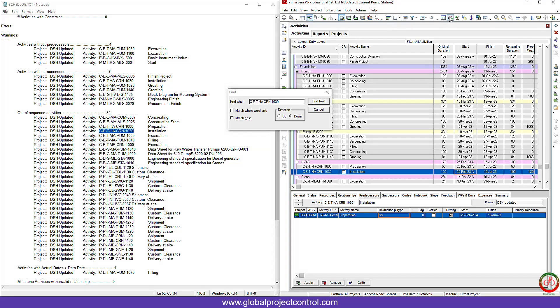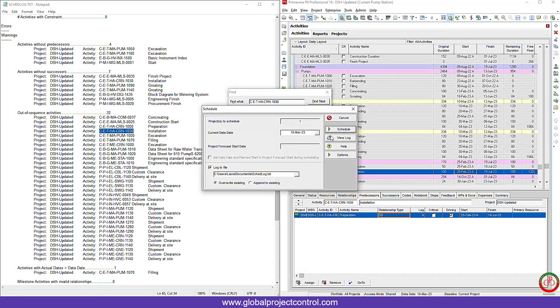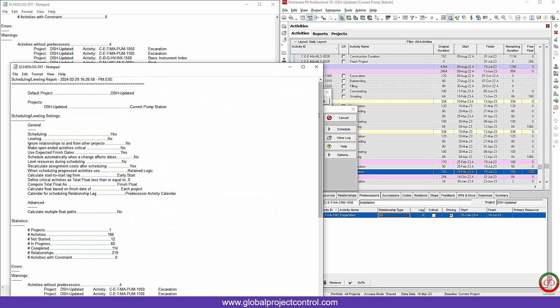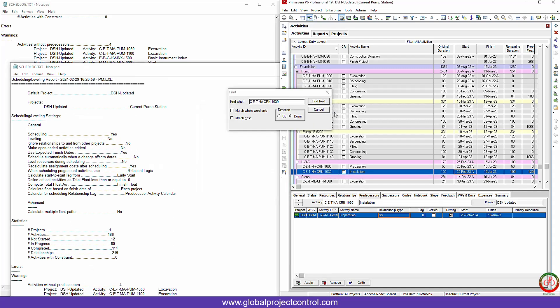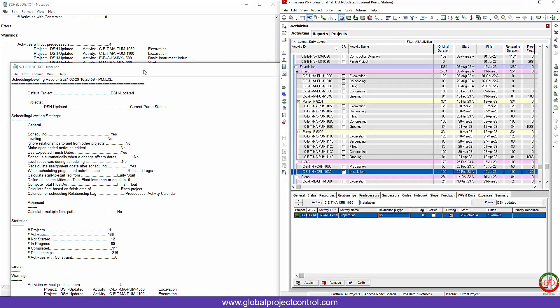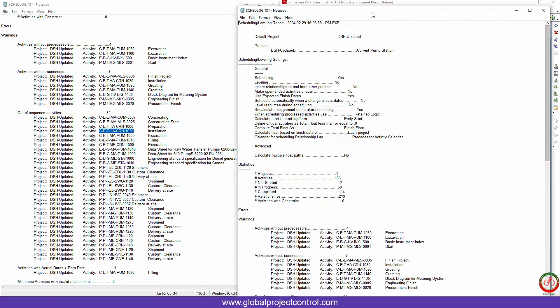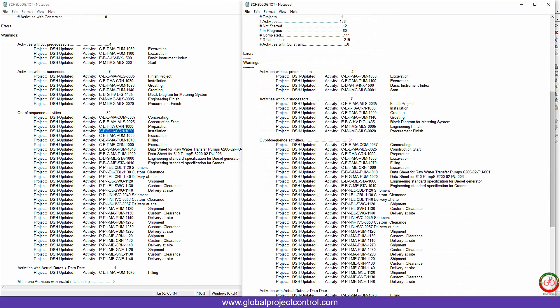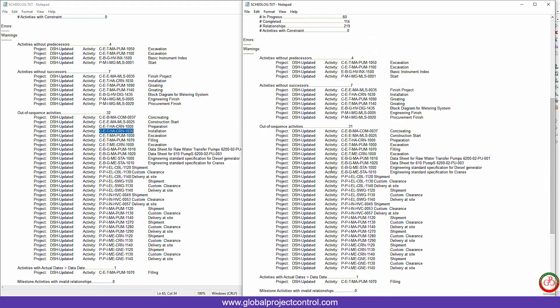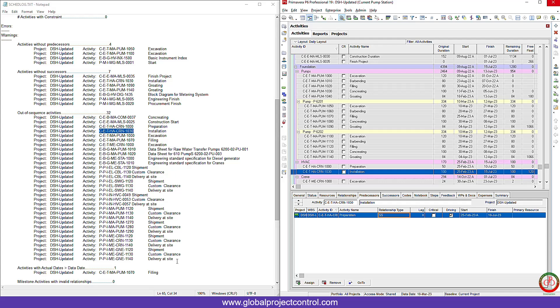And now if I schedule the project, find again and I go to the view log. As you see, here I have 32 out of sequence activity. Here I have 31 out of sequence activity. It means that this one for the installation already cleared and I have less things to do.